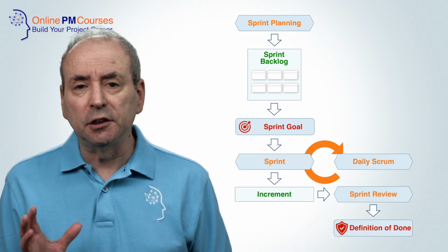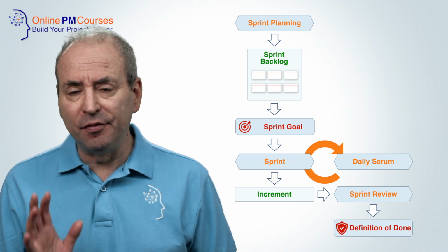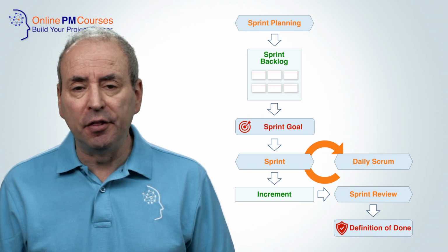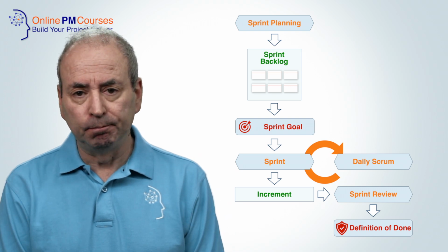At the sprint review, the Scrum team and their stakeholders will collectively determine whether the development team need to make any further adaptations to the increment in a future sprint. The sprint review is also an opportunity to discuss progress, review the product backlog, and determine the next set of priorities.